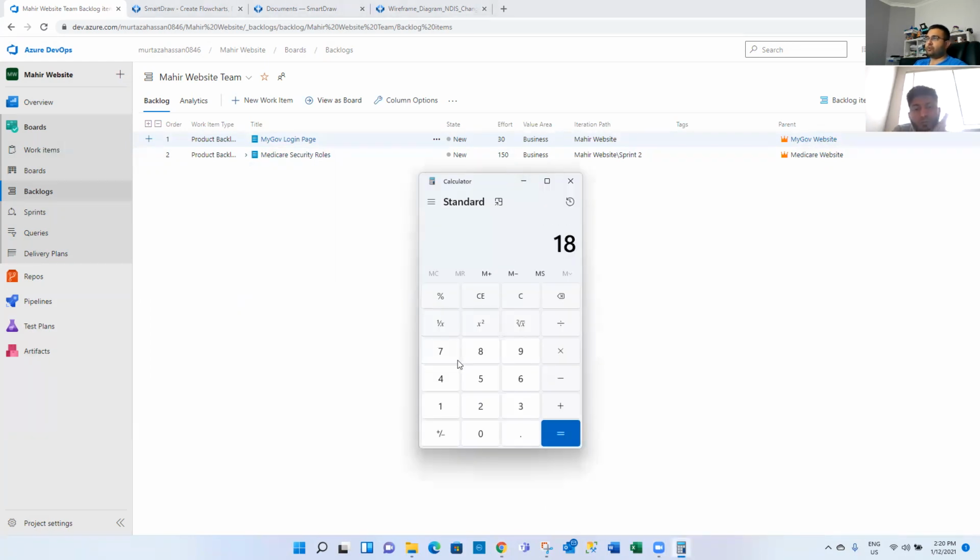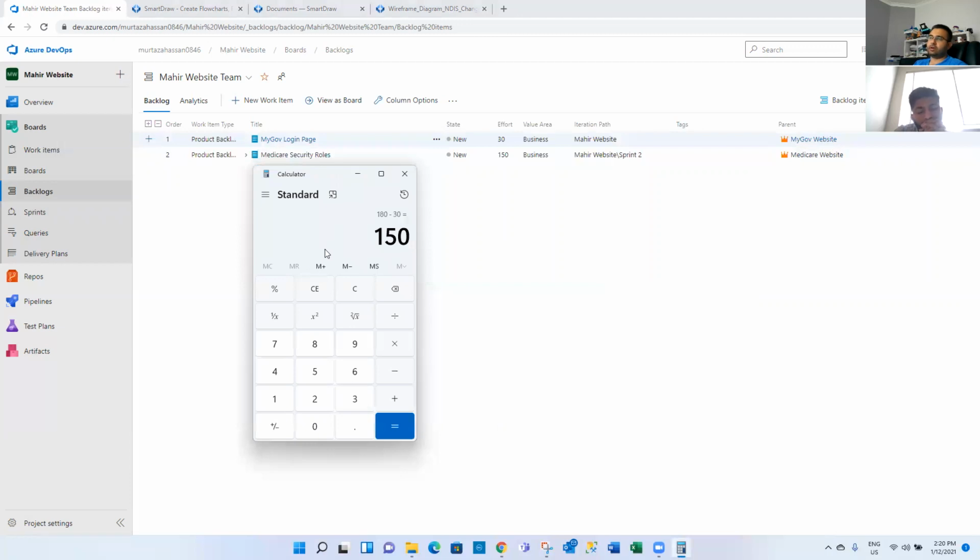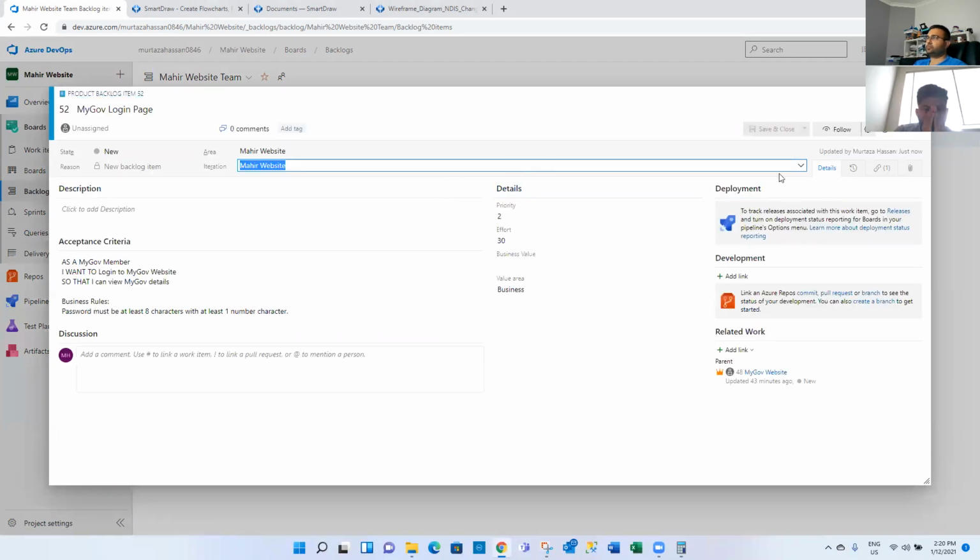Okay. So again, remember it's a new sprint. So we have again 180 hours of development, right? You minus the 30 hours, right? So 180 minus 30. Right, and then what's remaining of the security roles? Maybe the 20 hours is remaining of this role. So we get 20 hours. Okay, so now we have 130 hours and other user stories we create, we can add that to sprint 2 and go from there. Do you get what I mean? Okay. And it works in a life cycle.